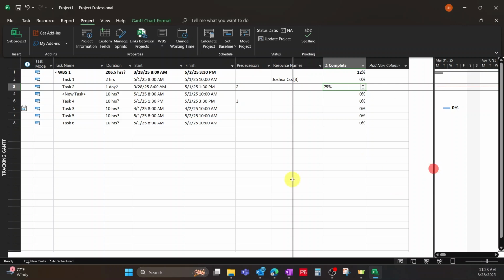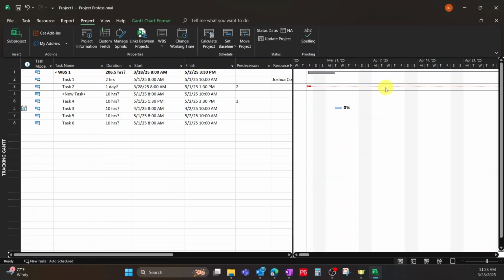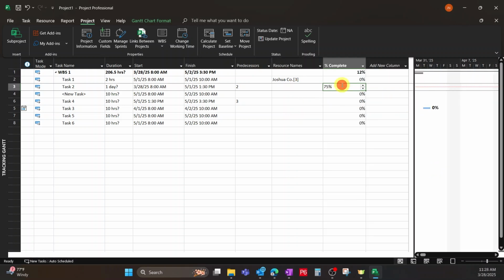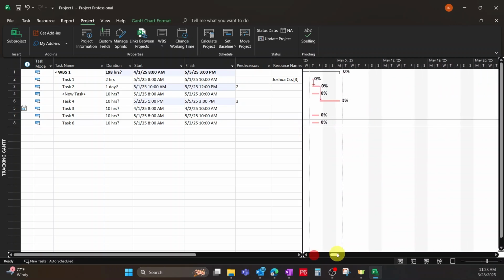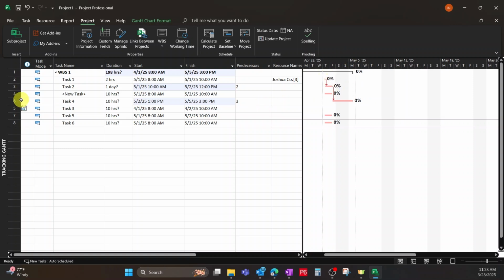This is a good visual here that we have a task that its predecessor hasn't started, but the task has some progress too, which logically doesn't make sense. So that's what this dotted line is going to show us. So we're just going to take off that, and now it's going to redo that and clean the schedule up better. That's why I really like auto schedule, because it has the thought process to understand that. So project information, we just went through that.